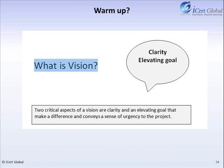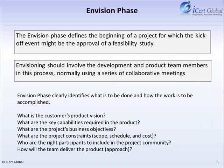Vision: two critical aspects of a vision are clarity and elevating a goal that can make a difference. The vision statement must articulate the goals for the product. The InVision phase defines the beginning of a project, for which the kickoff event might be the approval of a feasibility study.